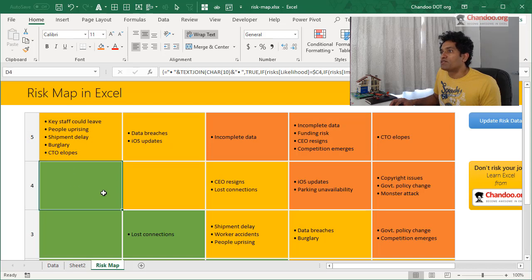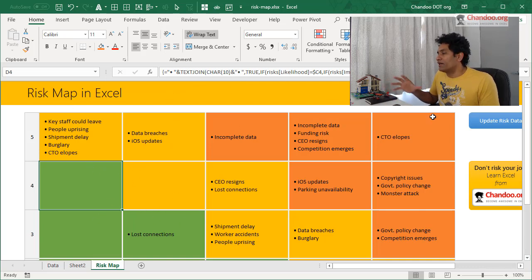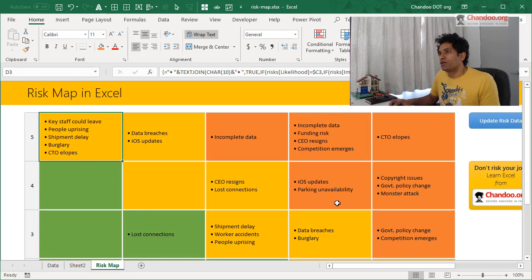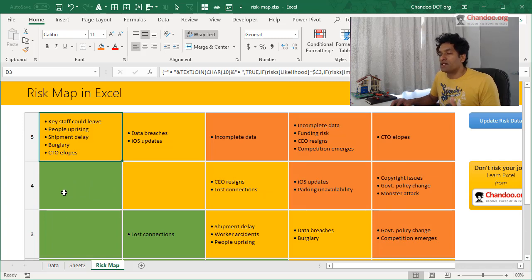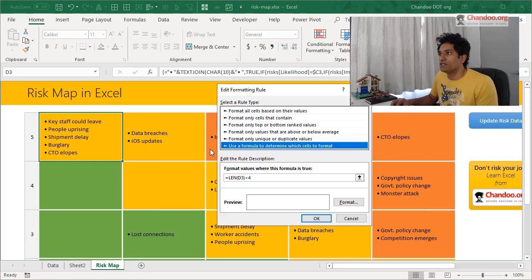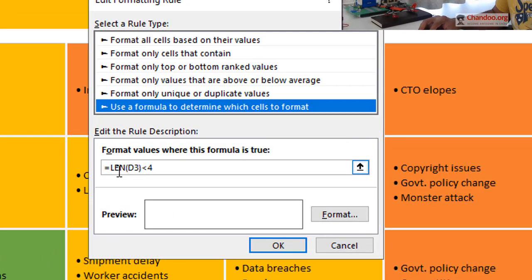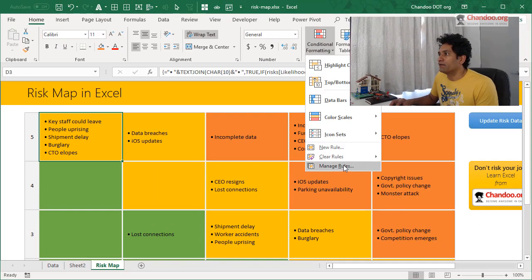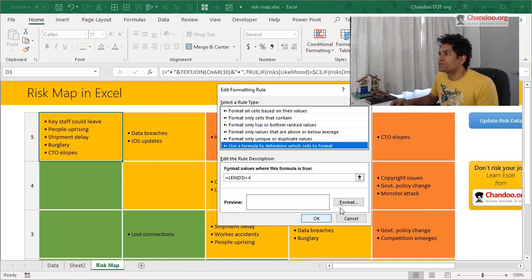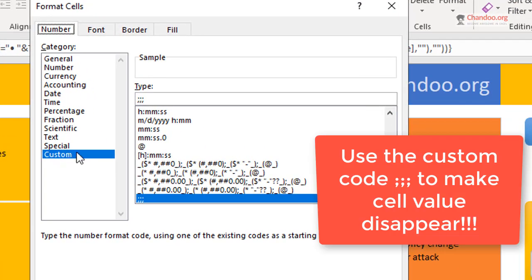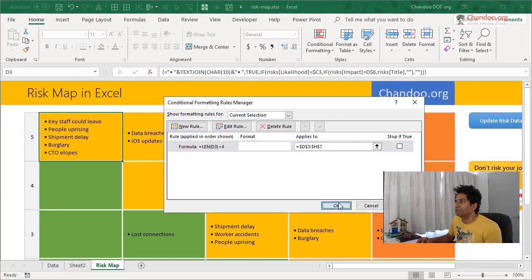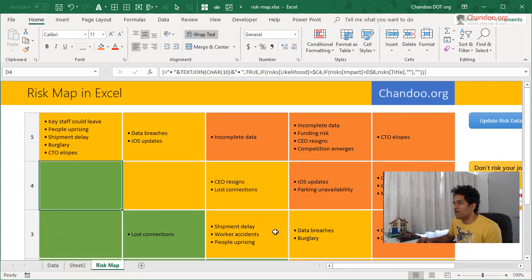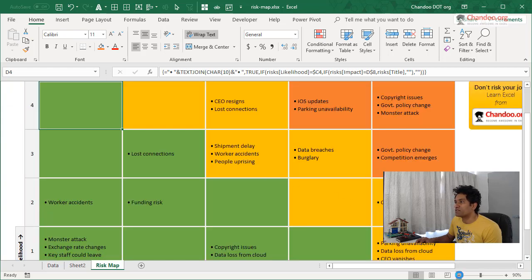So that means here in this cell, there will be a bullet point, even when there are no values. We could do a little more like a count if condition in the front, but that gets too complicated. So instead what I did is I applied conditional formatting. And I said, if the text length in the cell happens to be just three letters, then hide it away. So to do that, we go to conditional formatting manage rules. I've already added it. So all I've been doing is the length of that cell is less than four. That means it's three letters or two or one, then just hide it by applying the format code with custom and then three semicolons. That's the code to completely make text values or any values disappear from the cell. They're there, but you can't see them. So the cell has a value, but we can't see them on the screen. So that's how you can make a risk map.